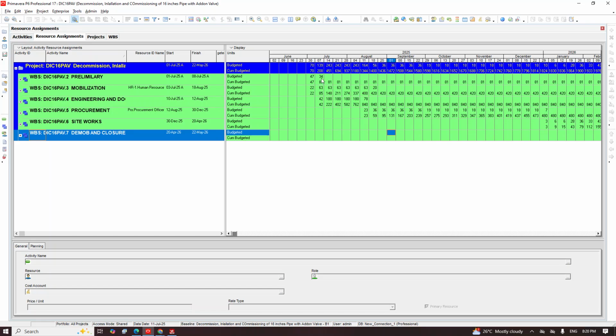451. So cumulative is a summation of all the budgeted labor units on an interval basis, based on the interval you have selected. If you said your interval is 1 month, that's what you'll be seeing. You'll be adding it up every 1 month. It becomes your cumulative. Okay?